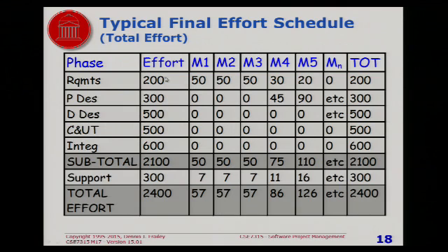So what I did is I took my effort schedule and I added a row for the support tasks, and that gave me the total effort. Remember I said the total effort was one of the blue words. I didn't put it in blue here, but this is the same total effort that I had before.